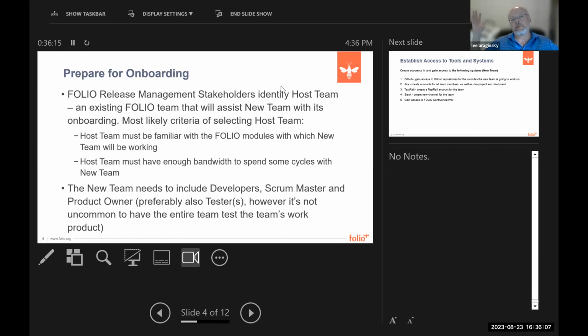And then they simply said, well, we're out of time. So the budgeting should not be top heavy, so to speak. The host team should budget enough time a month or 2 months down the road, when the new team is more or less up to speed but has issues or questions. So that's one thing that I just thought of.